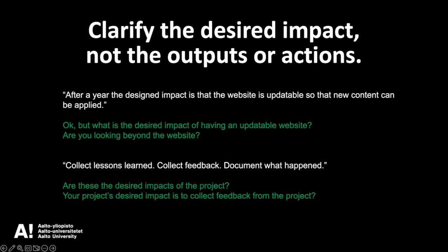So make a distinction here: the whole point of the exercise was that once the project ends, you might leave that workplace. Maybe you're a consultant and once the project is over, you're gone. But the project was done for a reason, and the success of that project is most probably measured after the project is done: 1 month, 3 months, 6 months. If you want to do that project really well, then you should understand those impacts that are outside the project. And those impacts are not outputs, not technical things you produce, but actions, measurements, metrics, and so forth.